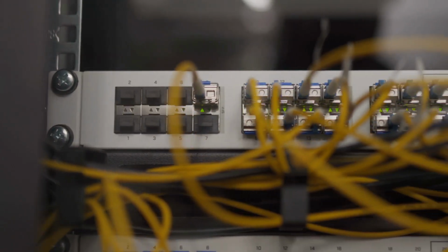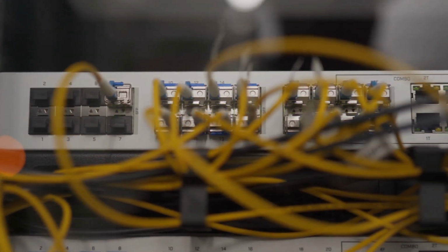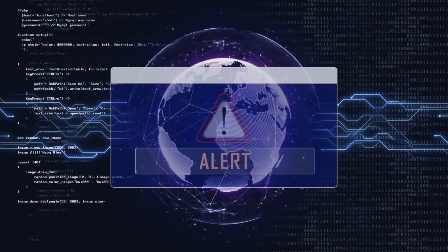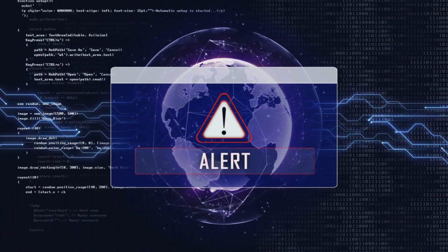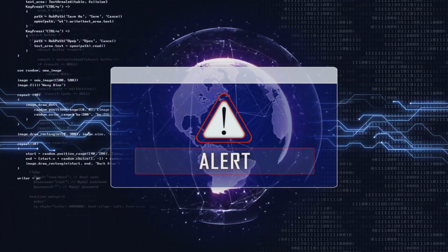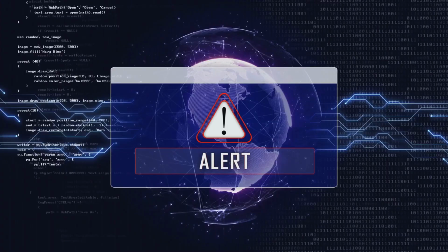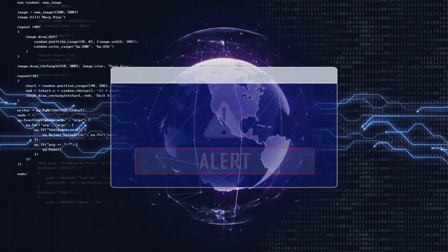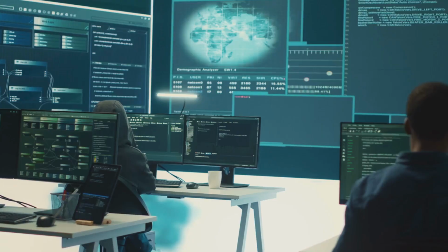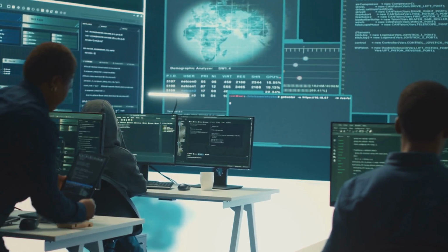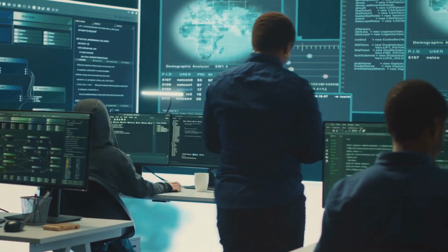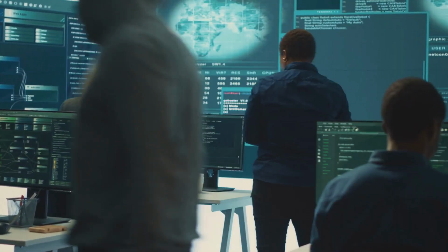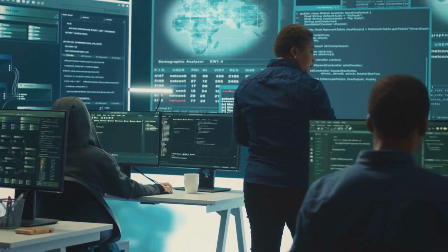Consider a practical example. A large city with diverse neighborhoods. An AI model flags a small, overlooked suburb. High concentration of remote workers, rising property values, only one slow, legacy internet provider. AI predicts 45% take-up in year 1 versus 25% city average. Operator prioritizes that suburb for initial rollout.